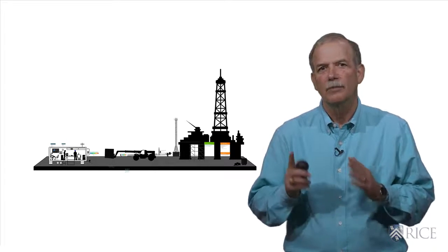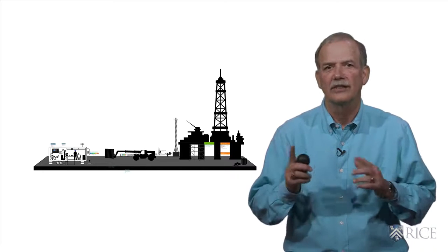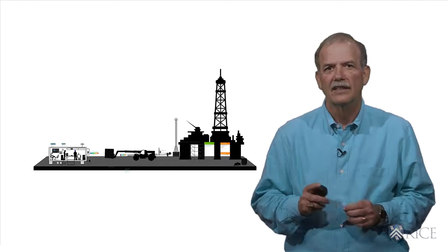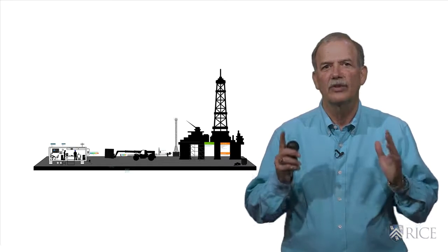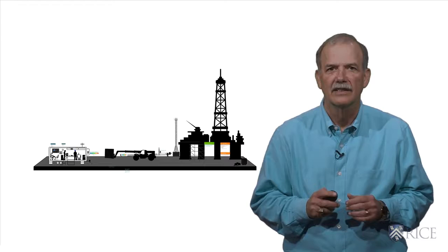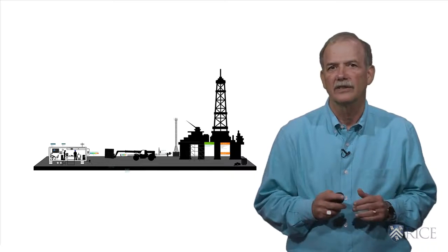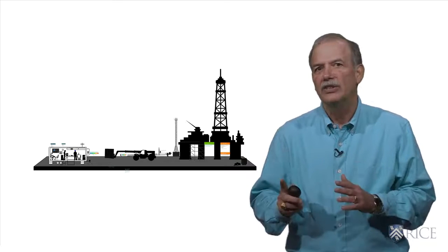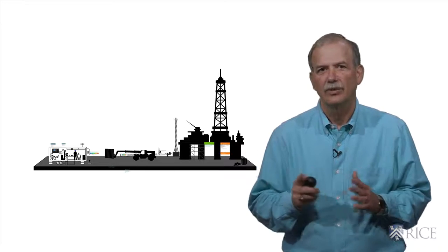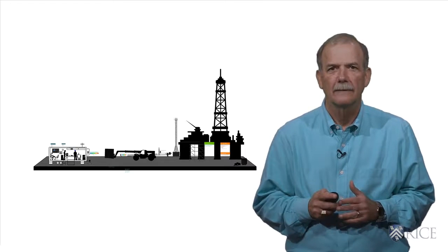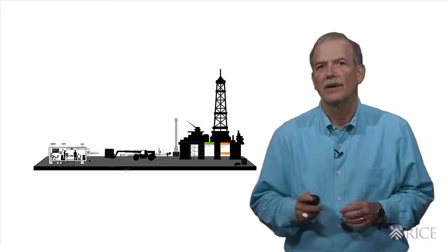In many cases, the project charter is actually part of the contract the organization signs to deliver the project. This is especially true if you're part of an organization that is executing a project on behalf of a client. The contract may contain all the information or just part of it. Any information in the contract is given and cannot be changed without a formal contract process. Any missing information will have to be filled in by the project team.